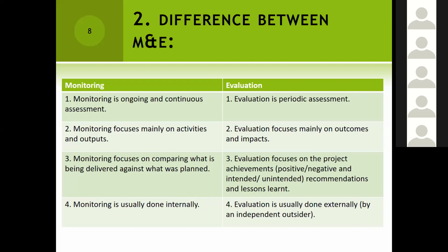Again, when it comes to monitoring, we focus on comparing what is being delivered against what was planned to be delivered. And that's something we also need to see when you talk about evaluation, that is, compare what is being delivered against what was planned. And then when you look at evaluation, we also focus on project achievements, that is the positive, the negative, and also the intended or unintended, and the recommendations and the lessons learned.